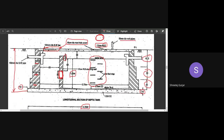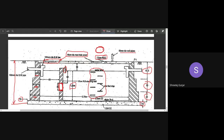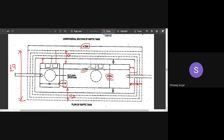For the RCC roof slab, use in-to-in distance plus half the wall thickness as bearing on each side: 3.7 + 0.1 + 0.1 = 3.9 m length, and 0.9 + bearing both sides. Slab thickness is 7.5 cm. Brickwork is calculated using long wall–short wall method for all three steps separately.